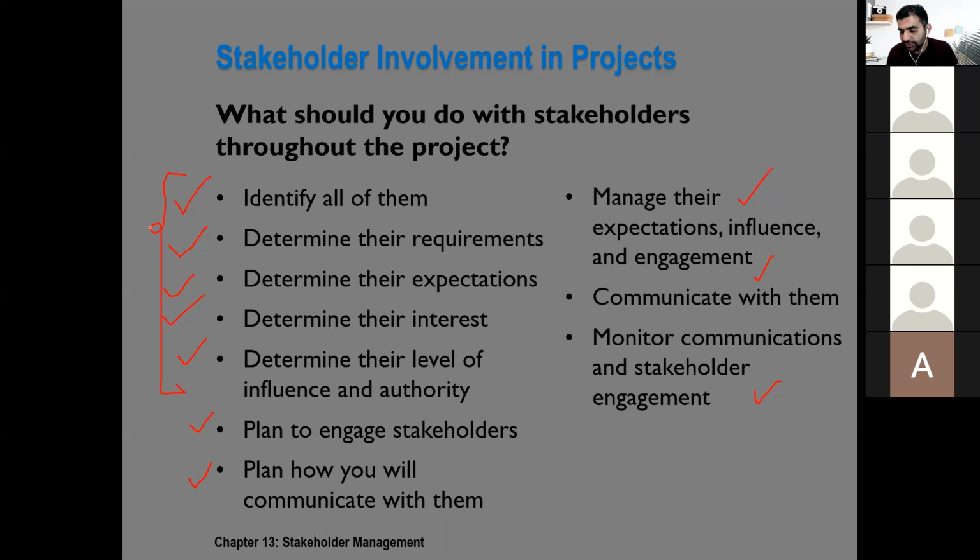You can use a variety of tools and techniques: document analysis, organizational reviews, looking at the lessons learned, conducting interviews with your sponsor to find other stakeholders, or interviewing the key stakeholders to identify all the stakeholders. You can also conduct some interviews and questionnaires for the sake of stakeholder identification. Once they are identified, you keep a record of them in the stakeholder register.